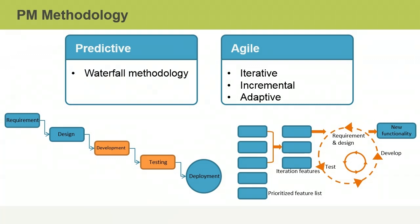Predictive life cycles are plan driven and change is not encouraged except as a way to prevent defects or to correct non-conforming project work. The time, cost, and scope requirements are determined as early in the project life cycle as possible. Then, the project would proceed according to the plan.